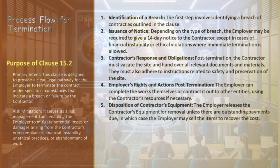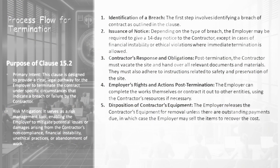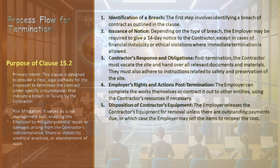The process begins with the identification of a breach of contract. This breach must fall under the specific criteria outlined in Clause 15.2, such as non-compliance with performance security, project abandonment, unauthorized actions, financial instability, or ethical violations. Once a breach is identified, the employer issues a notice to the contractor. In general, a 14-day notice is required. However, in cases involving financial instability or ethical violations, the employer is permitted to terminate the contract immediately without the standard notice period.